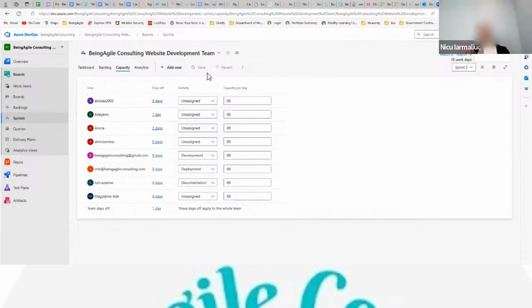Okay. So now when we're saying active time, the way they're planning their work, they also know that we will be spending all this time in meetings. So when they are committing to their user stories, they have all of that in mind. They typically reserve a buffer, say 20% of what they are overall given.